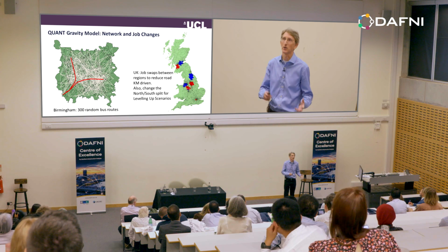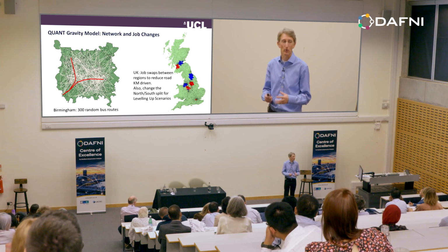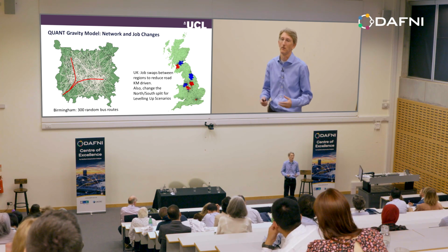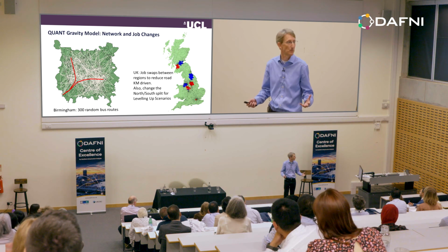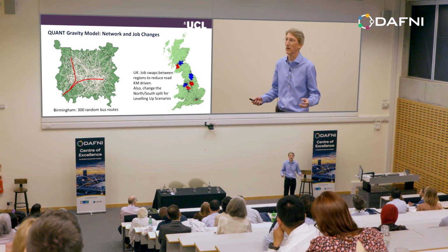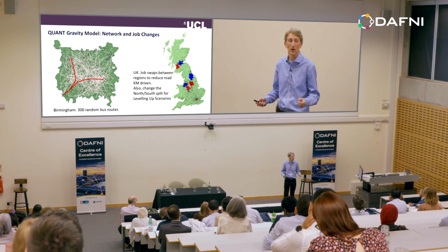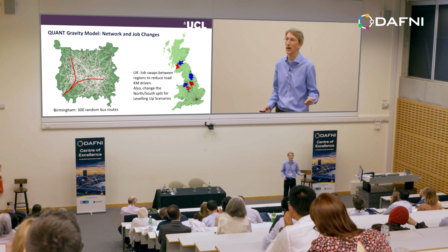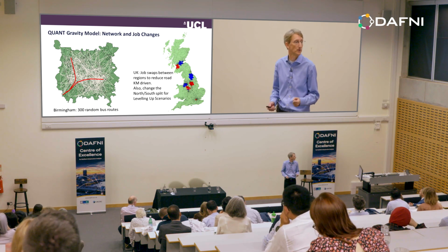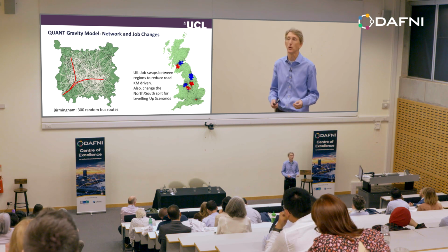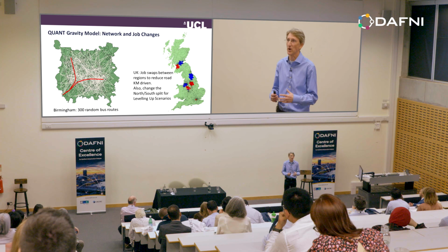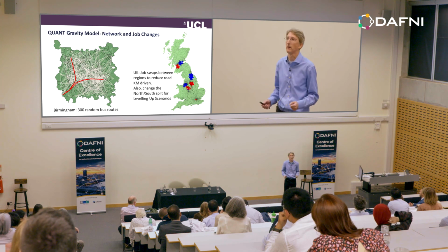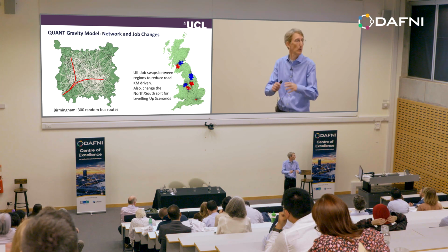There's a theory that says if you take a project like HS2, a big, complicated, expensive project, and you break it up into lots of smaller projects, you effectively de-risk your projects because you've got lots of smaller ones. And the potential is you can actually generate more overall impact by building projects geographically all over the UK instead of concentrating them all in one area.